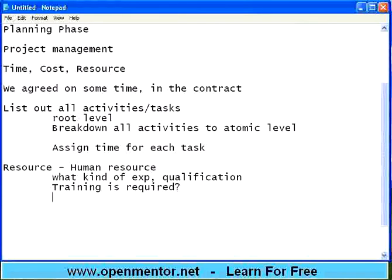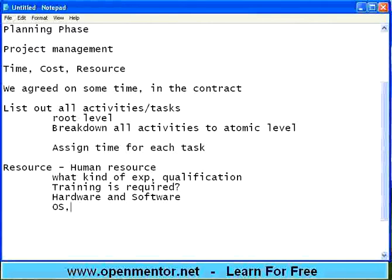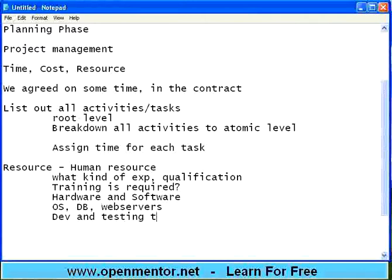Human resource is one area. Then there is hardware and software — you may require servers, desktops, iPhones, mobile devices, routers, network connectivity, OS, database, web server licenses, and development and testing tools. Each license is a cost. Each machine is a cost. Each human resource is a cost.